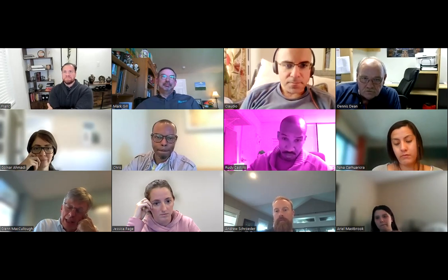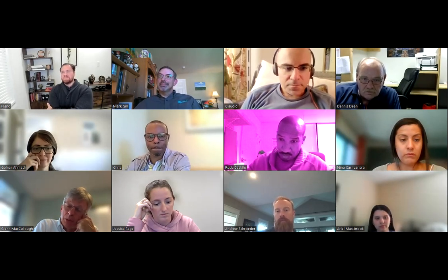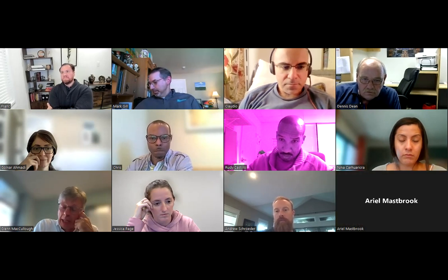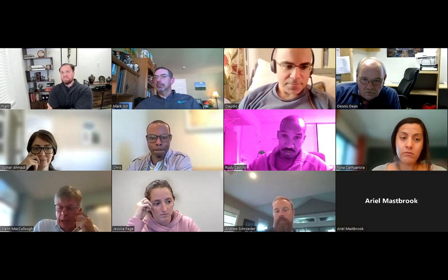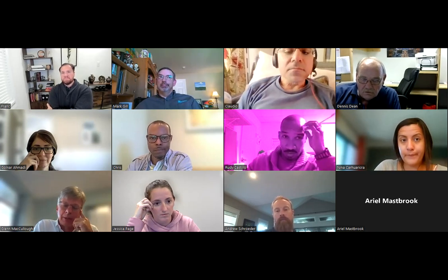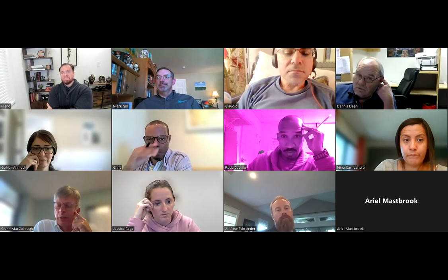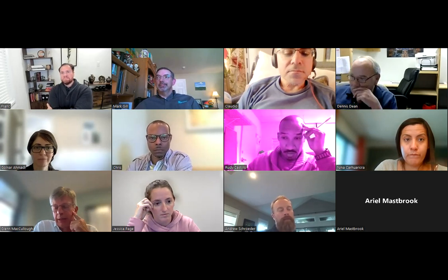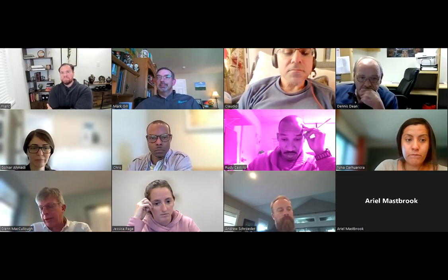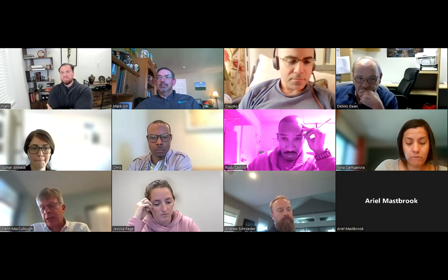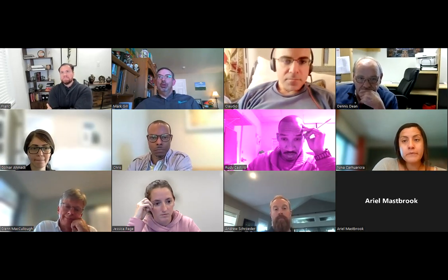Thank you. And again, you know my point of view, the drawings, you will have gone left or right or up or down from the design agreement wherever you are. So it has to be coincident with the drawings, not just a rehashing of the design agreement, because it could have easily changed in the course of that process. Absolutely. 100%.